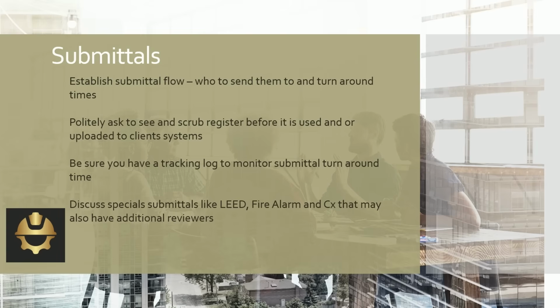Yeah, you can get caught in the trap if you don't establish this right out of the gate. Like Renee said, your owner or your client has a dedicated amount of time that they have to review. So you've got that time, then you've got the time for the design firm, and if you have a specialty design, fire alarm, cathodic, commissioning, that adds time.